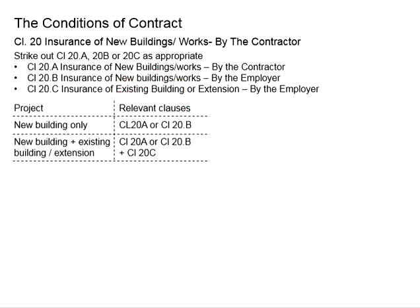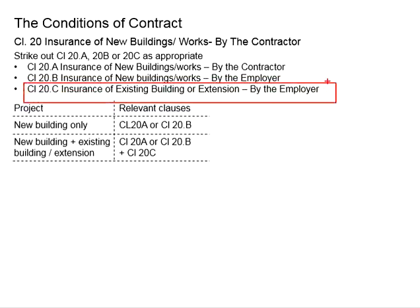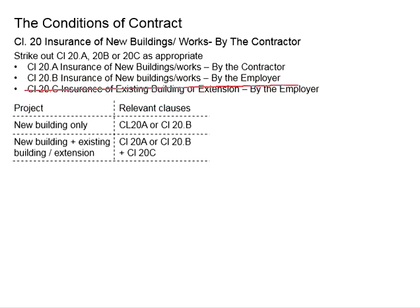Clause 20C is subject to the existence of an existing building. If the project is fully related to new buildings or works and there is no existing building within the site, Clause 20C will not be necessary and may be struck out. For better illustration, let us look at a table.